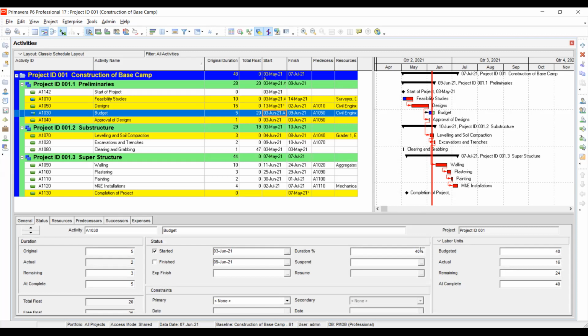Okay, the reason they are changing to yellow is because we put in a new date to show that the project has reached this date. There's an activity that has reached that date, and these ones have their start below the date we've put. You can see the ones that are in yellow. This one has 4th June. This one has 3rd June.